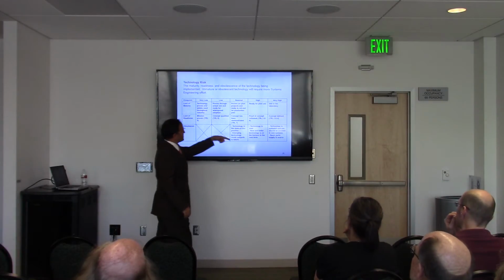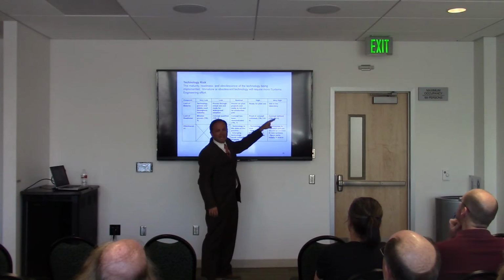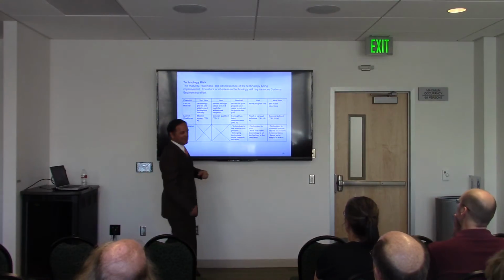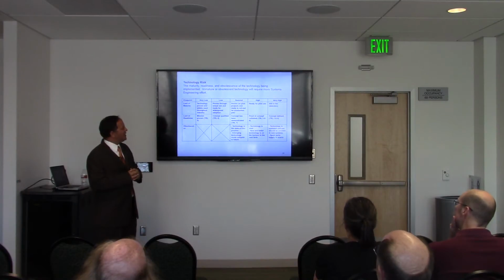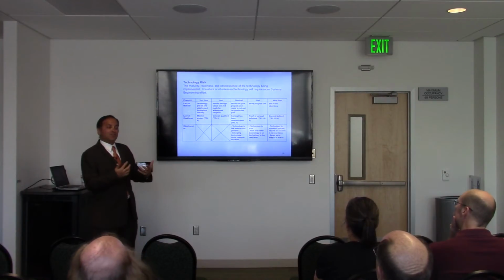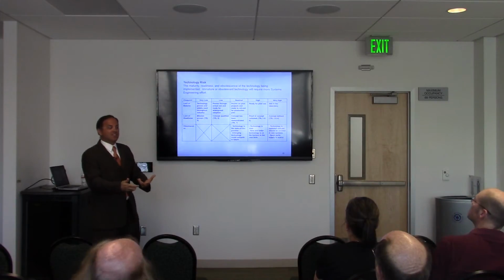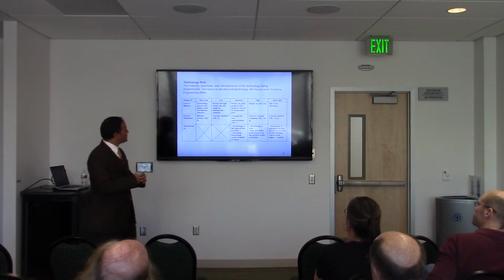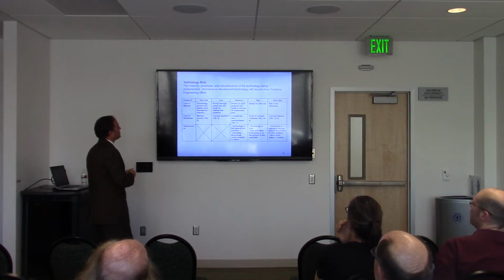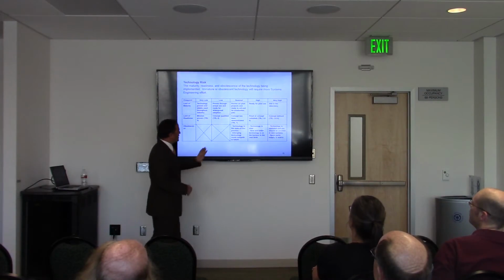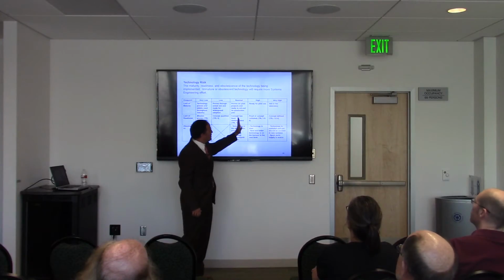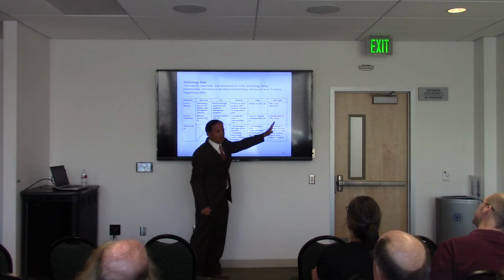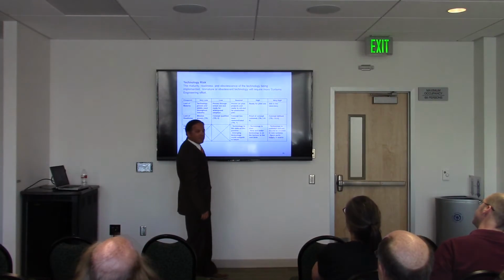Okay? Other end of the scale, if you are still tinkering in the laboratory and you need to eventually graduate this technology to something close to level 8 or 9, then you have a very high technology risk. It doesn't mean you won't be successful, it just means you need to invest system engineering person months into that, right? So that's the kind of way that we characterize one of the cost drivers. We typically define the nominal case as being typical. This is sort of the default setting on the model, and you have to make a decision on whether you belong on the right side of nominal or on the left side of nominal.